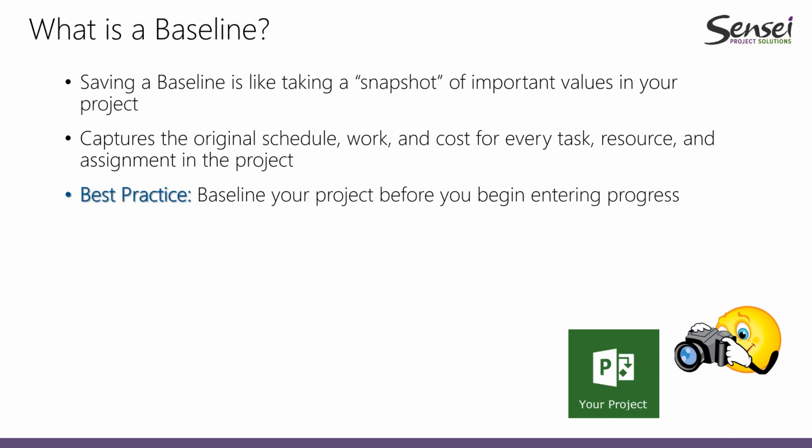As I said, it's very important, and our recommendation is that you always save a baseline in your project before you get to the execution phase, when you begin entering progress. The best moment is when you finish the planning phase: you set a baseline, saving the information that you have planned, and as soon as you start tracking and executing your project, you will be able to compare the information.